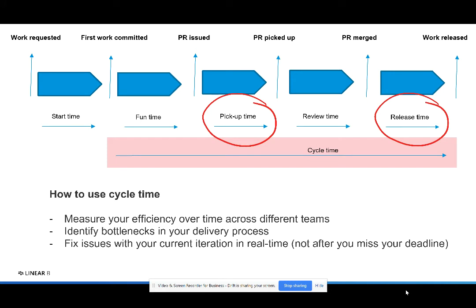You can actually look at cycle time in real time to fix issues in real time inside of your iteration versus after. For example, if your review time is a lot higher in your current iteration than normal, that may be a signal that your team needs more information from product management, and you can dig in and fix that to ensure that you hit your date.